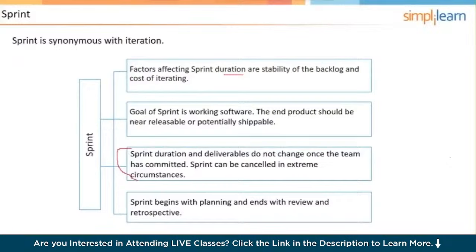But the product owner does not weigh in on what went well, what did not go well, and what we are going to do differently. That is all owned by the team. In the planning meeting, the product owner has to be there, and the product owner is the main driver of that meeting. The product owner is dealing with the priority of the user stories. The team's weighing in. Maybe there are some dependencies that need to be considered, but the product owner has to make the hard decisions with regards to what's going to be done in the next sprint based on the constraints from the team, like velocity and technology and sequencing and things like that.